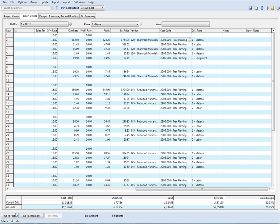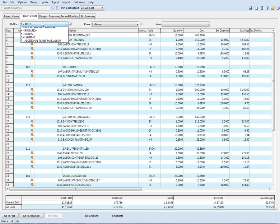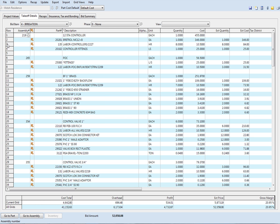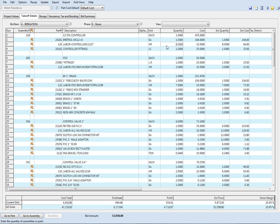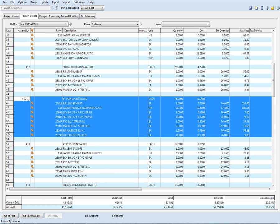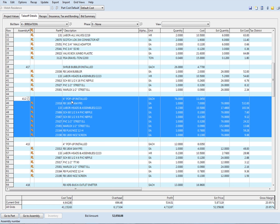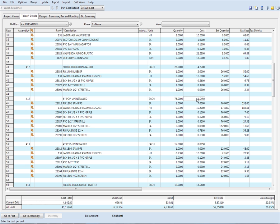Let me show you one more before I show you how I work this. Let's go to irrigation. On this job, I need a 12-station controller. So I have to buy one controller, I need eight hours to wire it and program it, and I need a bunch of fittings at $25 as a lump sum item. Down below, I have a six-inch pop-up. I need to have 76 of those. So I need one of those, almost a quarter of an hour to do that, a couple of different size nipples, an elbow, two more half-inch L's, and a little nozzle on the top and a screen. So price all that stuff in. I need 76 of them. At this point, it's going to be about $11.05 to do that.